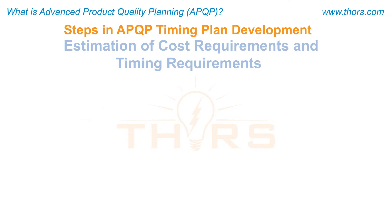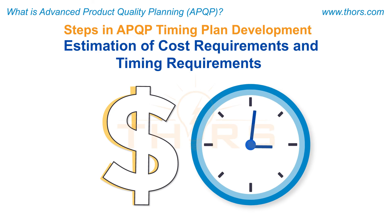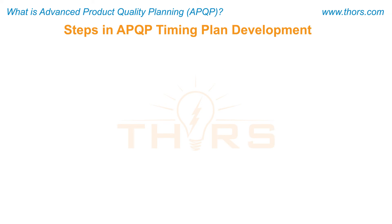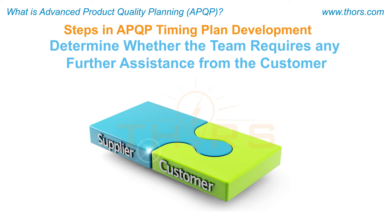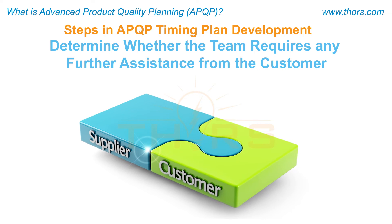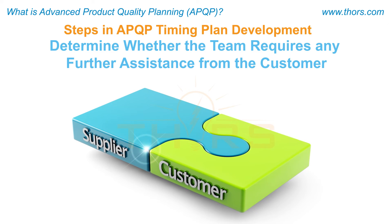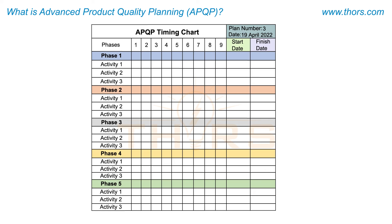In the fifth step, the multidisciplinary team estimates the cost requirements and the timing requirements and identifies the concerns in the product development process. In the sixth step, the multidisciplinary team determines whether the team requires any further assistance from the customer during the product development process, such as the use of the customer's test facility or third-party test facility. Then, the multidisciplinary team finalizes the timing plan.